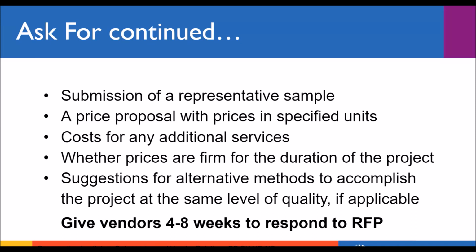So also, final note just about RFPs, be sure to include a contact person if the vendor has questions about the RFPs or if they just need clarification. Now, if they ask things that are probably relevant to the rest of the vendors that are also putting in a proposal, it's a really good idea to just send out to everybody what the question was and what the answer is so that everyone is working with the same information and that you're able to compare things appropriately.